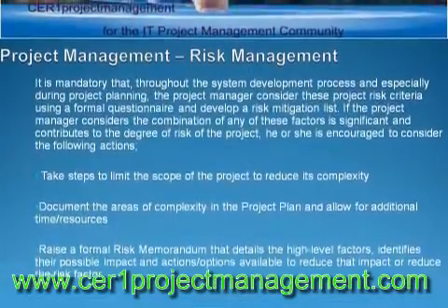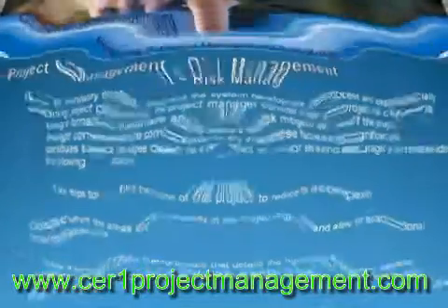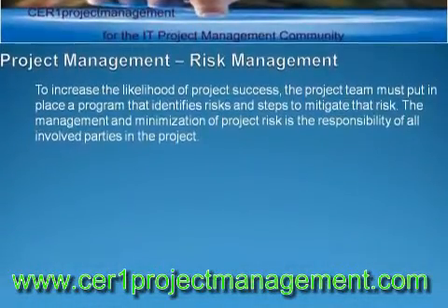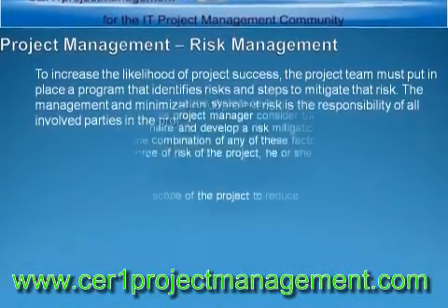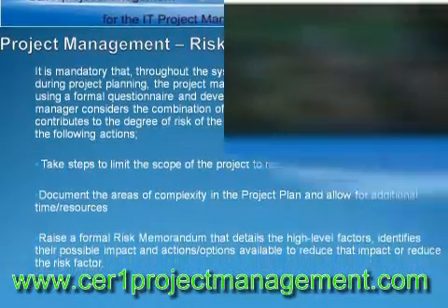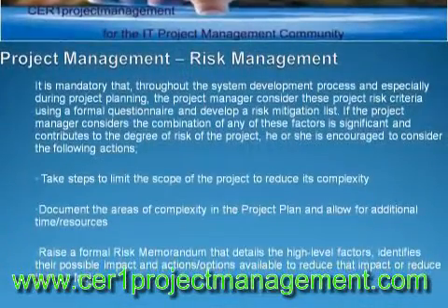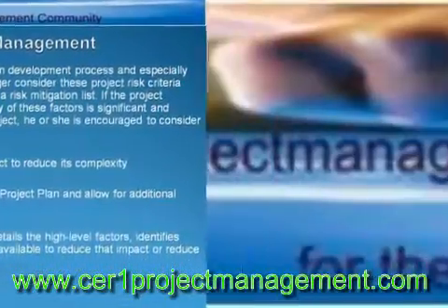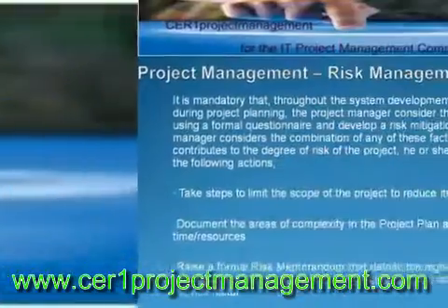The risk of a project can be established by considering the following criteria. What are the risks? What is the probability of loss that results from them? How much are the losses likely to cost? What might the losses be if the worst happens? What are the alternatives? How can the losses be reduced or eliminated? Will the alternatives produce other risks?